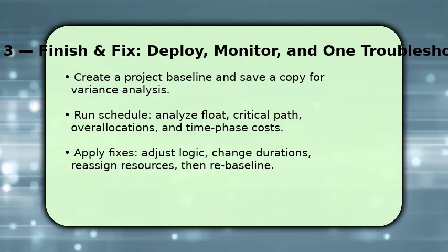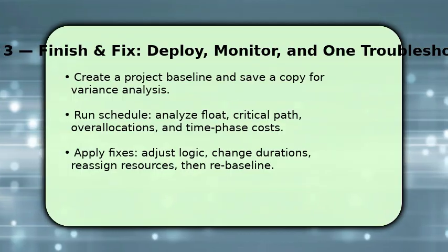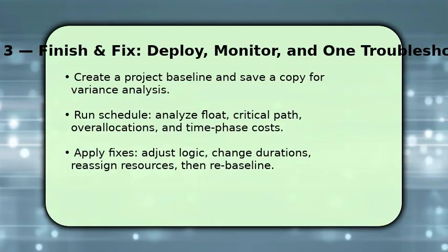If results are still off, check calendars and constraints first. Those are frequent hidden causes of unexpected dates.